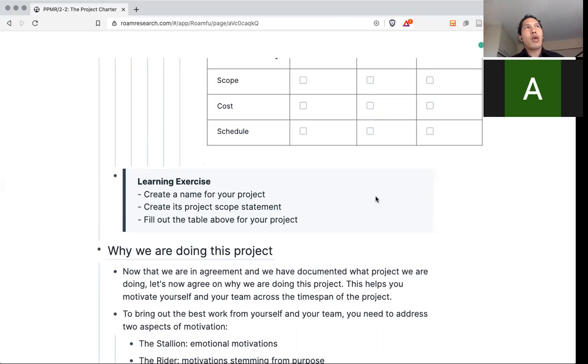Yes. So the way I look at this is, it's either just for myself as a project manager when I think about the project, or I show it to the team and the stakeholders. So I consider it already public. I mean, they can show it to anyone. So I normally place this in my public project charters, because I want everyone to know that in case in the future, as we do the project, we have to make trade-offs, and it's almost inevitable that we will make trade-offs, like you have to delay this. So I already agree at the beginning what is the most important thing in this project among the triple constraints. Does that answer your question, Ashish? Yeah, it does. Understood. Thank you.